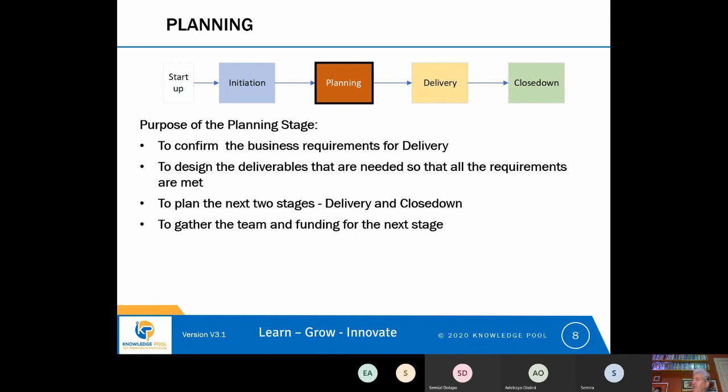If that likelihood is high, then perhaps Agile is not the right approach for the project. And so you might move to a waterfall approach where during planning, you gather all the requirements and you evaluate all the CRM systems to prove that the one you're picking can meet all of your requirements. Yeah.